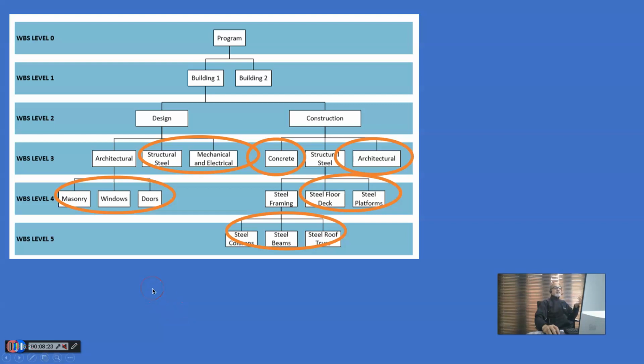So to go back, we have the work breakdown structure. The lowest level in the work breakdown structure, we call it a work package. Below work packages, there will not be anything. If you really look at a WBS, below the work packages, it won't be decomposed further.